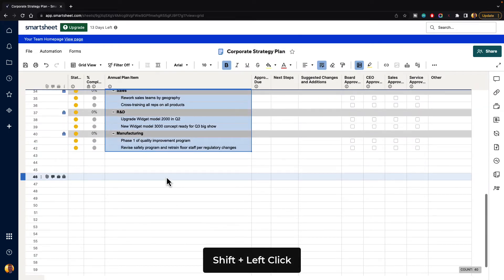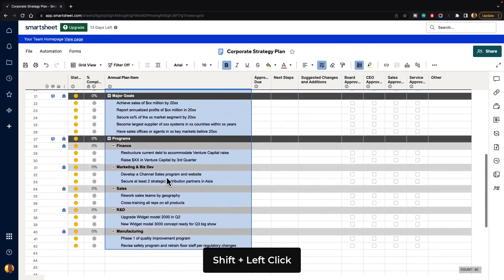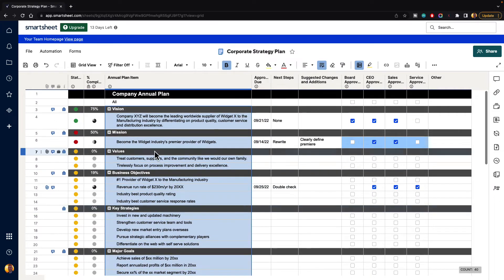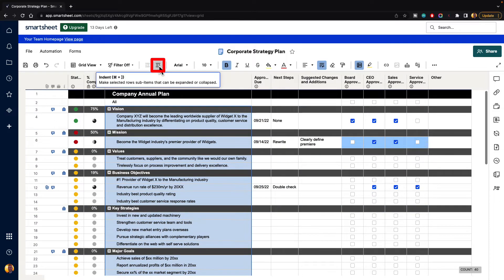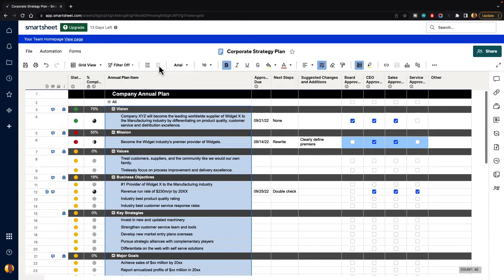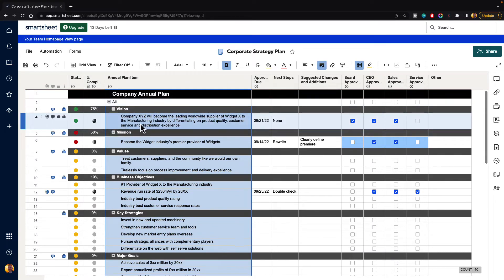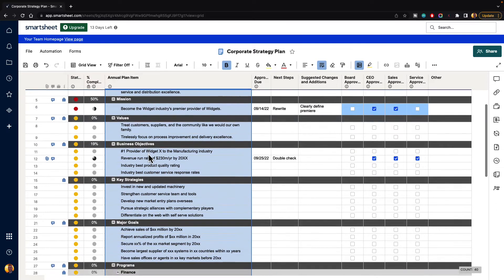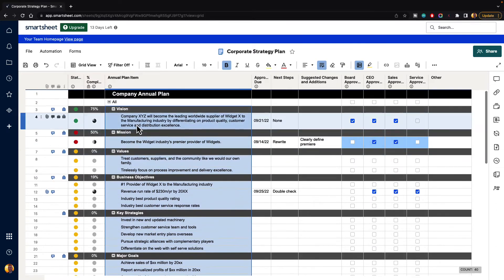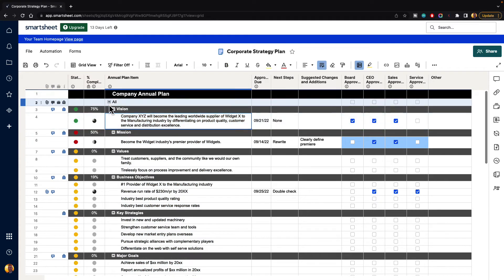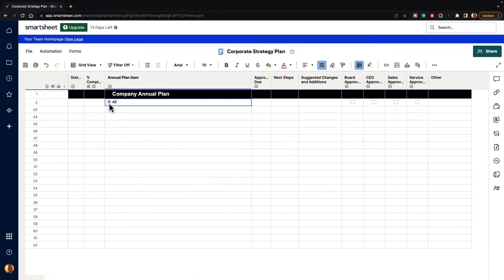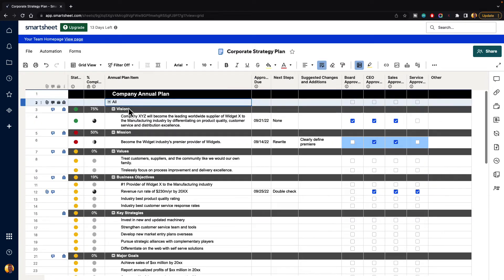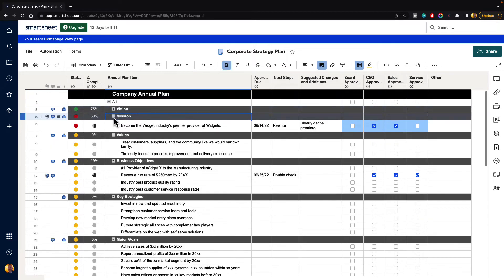it will select all of those for us. And if we go up to indent and we click on that, it's going to indent everything over and it keeps the relationship. So you can see this is still a child of vision, but now vision is a child of all. Mission is a child of all and so forth. So what happens is if we click on this, it will actually collapse everything for us. And that makes it really great if you need to have main departments or anything like that where you need to collapse multiple at a time.